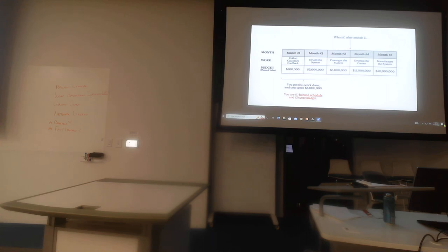But the problem is, you've spent $6 million to get them accomplished. So $6 million is going to be your actual cost. Your earned value is going to be $3.5 million. And then your planned value is going to be well above that. You're going to add $500,000 plus $3 million plus $5 million, because you expected at the end of month three to have those three things accomplished. So what this tells me is that we're behind schedule and over budget based on our EVM calculations. Earned value equals $3.5 million, and actual cost equals $6 million. So we've earned a lot less than we've spent. Bad measurement. We've overspent here.